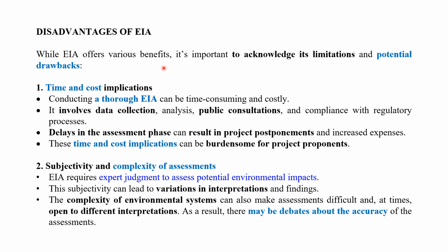The first disadvantage is time and cost implications. Conducting a thorough EIA can be time consuming and costly. Suppose you are going for a comprehensive EIA, definitely it will take one year. It involves data collection, analysis, public consultation, and compliance with regulatory processes. Delay in the assessment phase can result in project postponements and increased expenses. This is also possible. This time and cost implication can be burdensome for project proponents. So this is also one of the disadvantages.